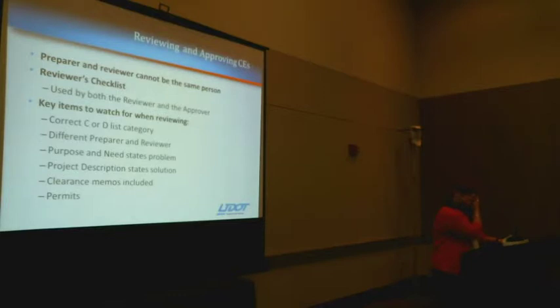And we can tell when you've fudged that a little bit. We know who did it and who didn't do it. So really, there's enough people in environmental for the work to be spread around. The preparer should be a completely separate person who's entering into EPM, and a reviewer is a completely separate person who's reviewing that PDF.